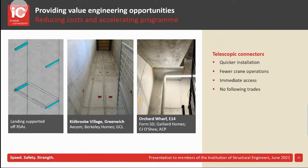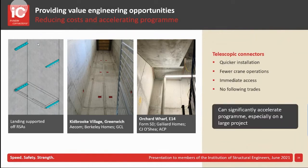There's no following trades clogging up the core either. An associate at Eric Parry Architects said the fact that there's no additional finishes required can really speed up a big project. We're supplying to South Quay Plaza, which is over 60 storeys high — no additional finishes in the core is a huge saving, both in cost and in time.